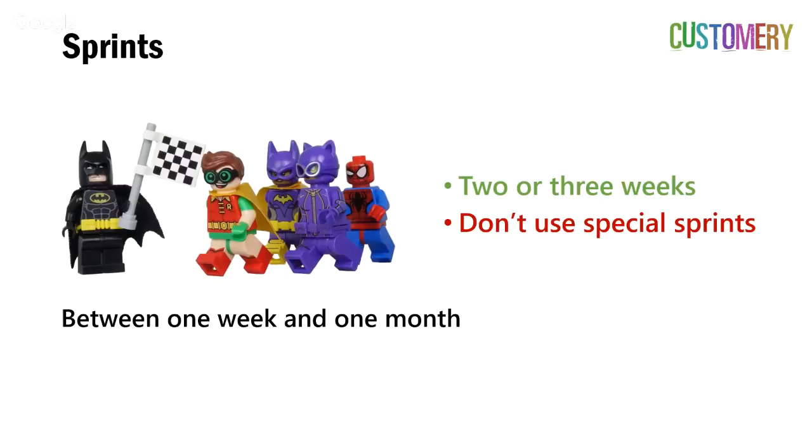What I don't recommend is using any kind of special sprint. My goal at the end of every sprint is to have software that's ready to release into production. I've heard of people using something called Sprint Zero. The goal of Sprint Zero is to have that initial product backlog identified. For me, that's not any working software. We haven't produced anything in Dynamics at that stage, so I don't want to call that a sprint.